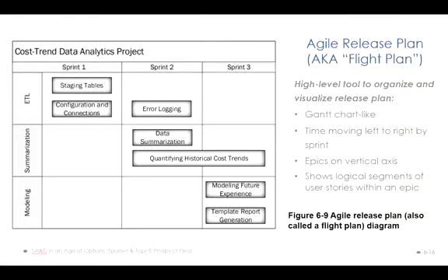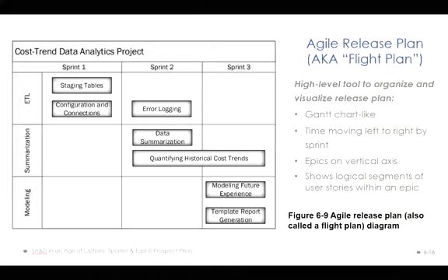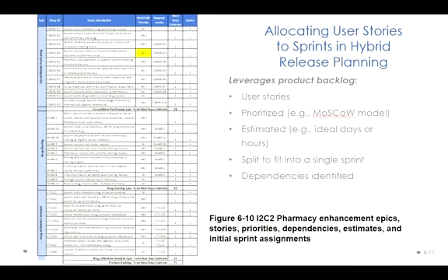So you present the job, instead of using a calendar, using a sprint as a management tool. So it's a higher-level project management tool. It's called the flight plan in the Scrum methodology. It puts together the Gantt-like chart and the project management, and the sprint and phases management together.